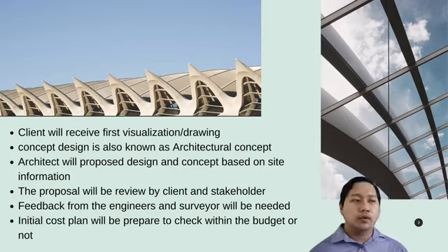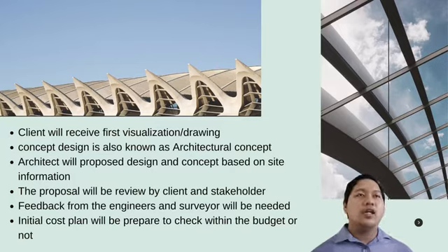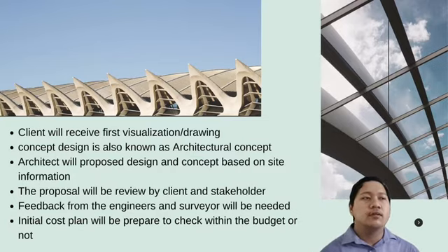If it is outside or beyond the budget, maybe there are two ways that can be done. First, maybe talk back to the client whether they can provide more budget, can increase the budget or not. Or the other one, maybe they can redesign the concept design itself to be more friendly with the budget.